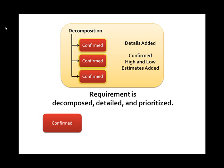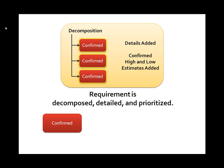Once prioritization is complete, the requirement, now part of the product backlog, can be accepted into a development iteration. When it's accepted into a development iteration, its state is moved to active.